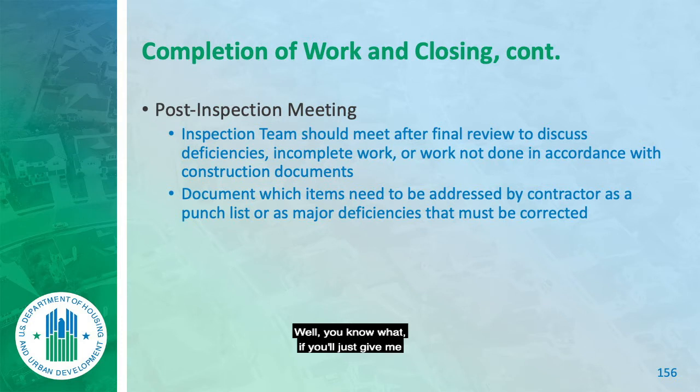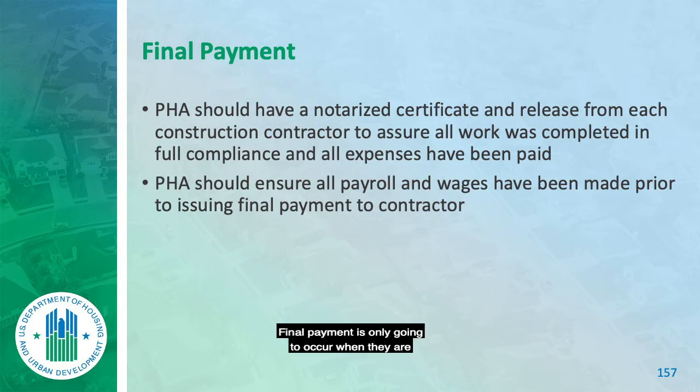Well, you know what? If you'll just give me my retention now, I promise I'll have it done by next week. Does that work? No. Everything has to be documented in writing. There is nothing verbal on this whole thing. Final payment is only going to occur when they are fully compliant with everything they were supposed to do.